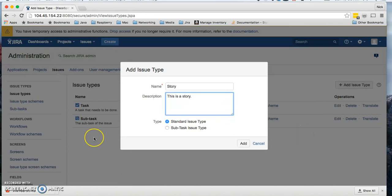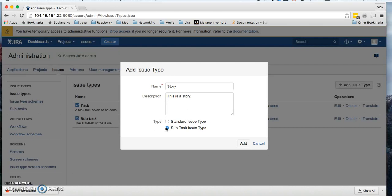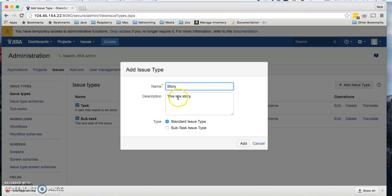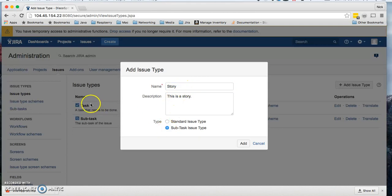We'll make it a standard issue type. You could make it a subtask issue type. What that's going to do is make it so you can associate it to a standard issue type, which would be a parent. For instance, if I made story as a standard issue type and then later wanted to create a subtask, I would call it development subtask, then choose subtask issue type, and I can relate many of these to my one story.